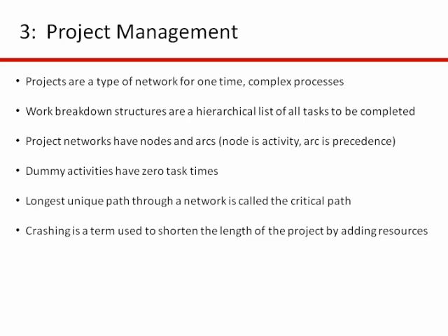All right, and typically when a project team is formed, the project manager will have a brainstorming session with their entire team, and then they'll use those little sticky notes to generate not only all the tasks and activities that all the members think need to be done, but they'll try to put them in some sort of a sequence and then estimate how long it'll take, etc. And so that's basically what a work breakdown structure is. The book provides us with all the activities and the sequencing and everything like that. So we don't have to worry about that to do the homework. However, I did want to mention it since it is something that, from a practical perspective, is important.